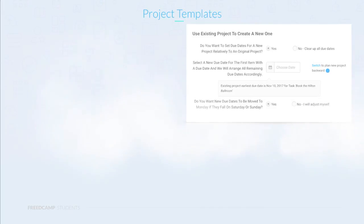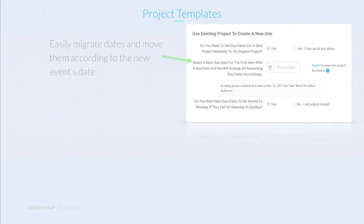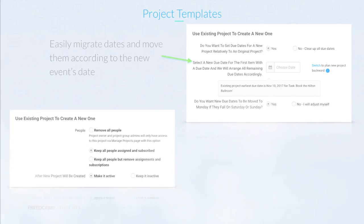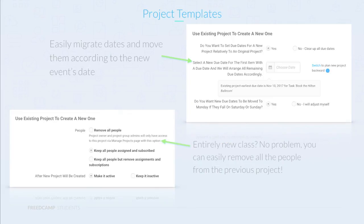You can adjust all the due dates in relation to the event's scheduled date. So if last year you had to order the caterers five days before November 10th, and the new event this year is on November 20th, it will automatically adjust the date to November 15th, which is five days before the event. In case the club members have changed, you can easily remove all previous members from the project.